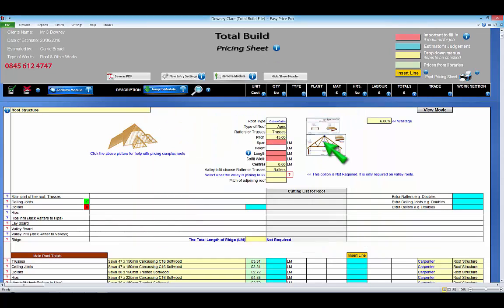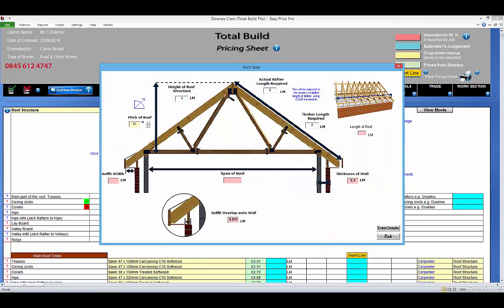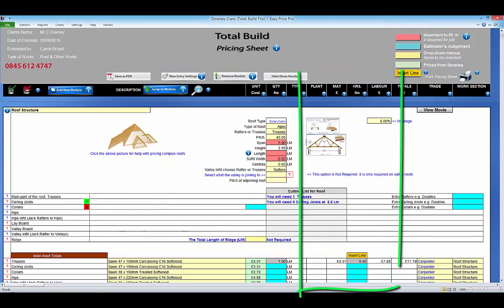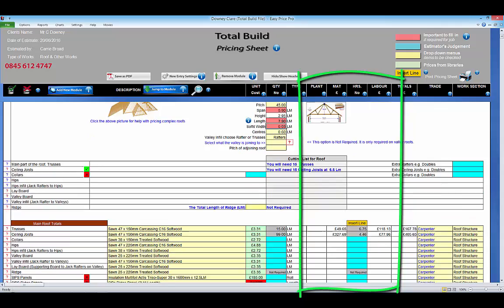Total Build estimating modules perform multiple calculations using the minimal amount of information. All the required materials, plant, labour costs and hours will be worked out for you.